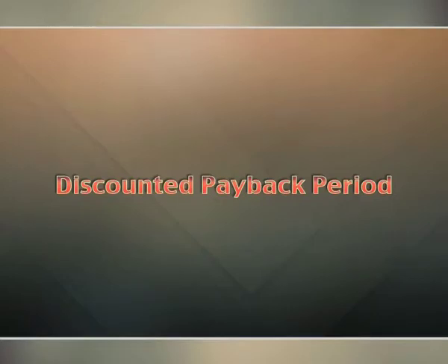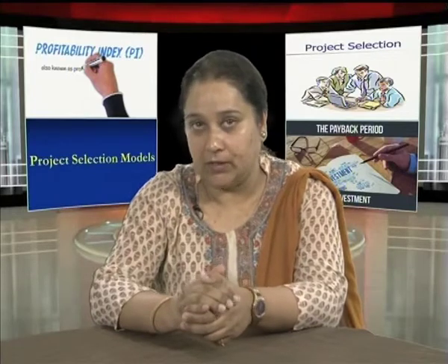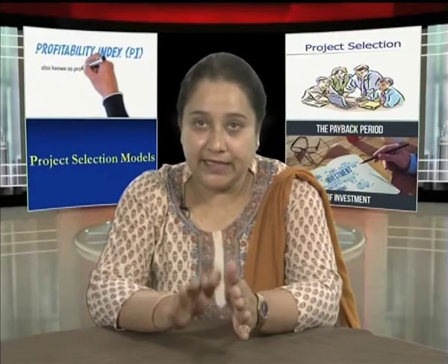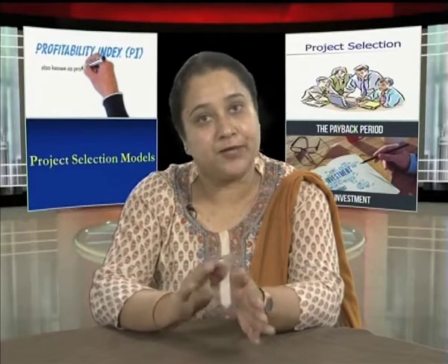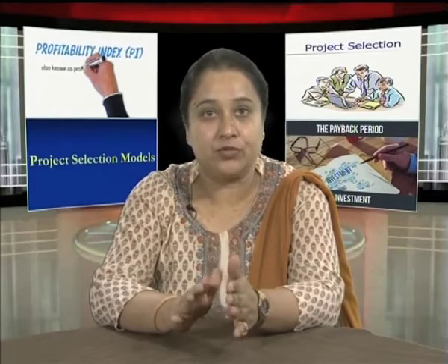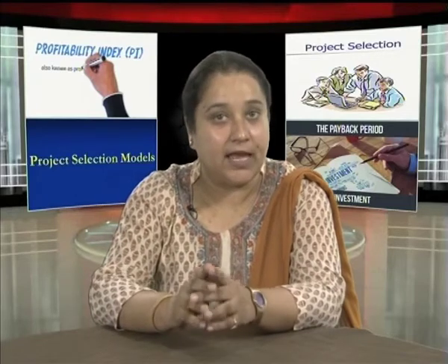Discounted payback period. The major shortcoming of the conventional payback period is that it does not take into account the time value of money. To overcome this limitation, the discounted payback period has been suggested. In this modified method, cash flows are first converted into their present values by applying suitable discounting factors and then added to ascertain the period of time required to recover the initial outlay on the project.